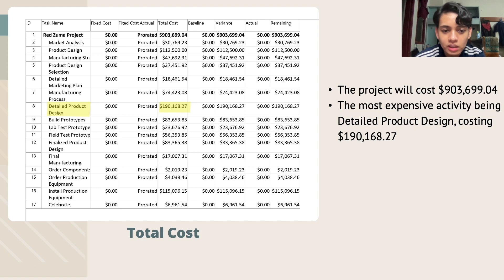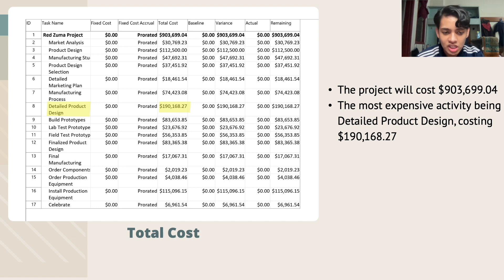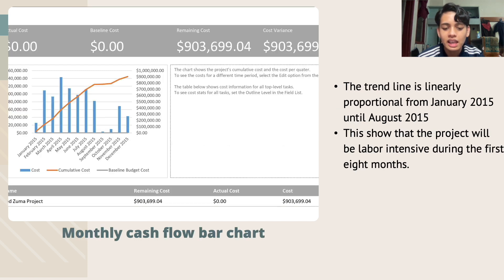The total cost of the Red Zuma project is $903,699. The most expensive activity, highlighted in yellow, is the detail product design, costing $190,168. Next, the monthly cash flow is illustrated using bar charts.